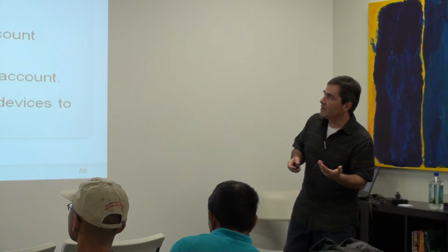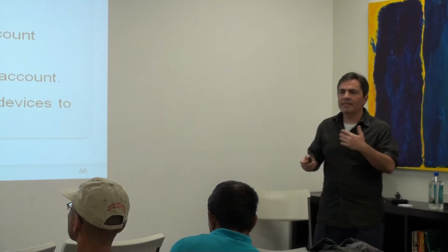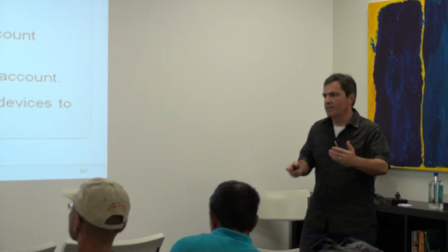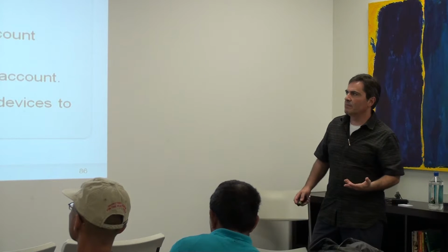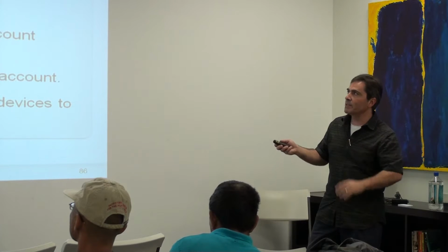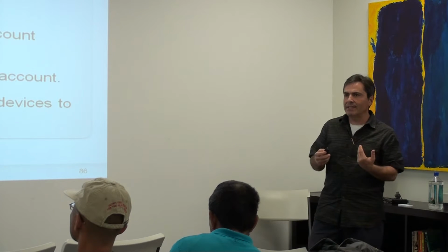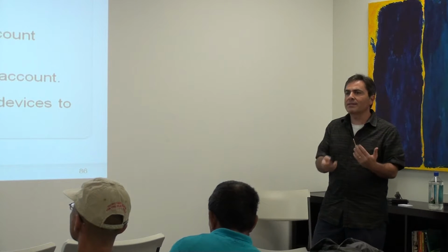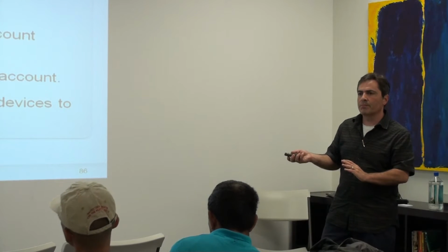And here's another one I was going to say: splitting by the CRUD operations. Anytime you see the words, I need to be able to manage my accounts, or I need to be able to manage my users, at the very simplest there's at least 4 ways to split that. One is, I've got to be able to create that thing. I've got to be able to read it back in. I've got to be able to update it and be able to delete it, or somehow mark it as deleted. At the very least, there's 4 ways to split that.